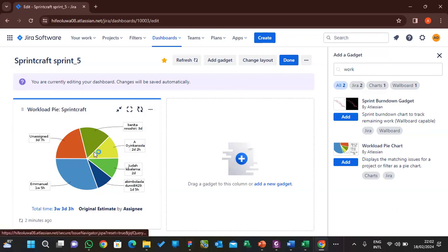I'll come back here for you to see that user story point is different. It is a relative estimate to size the user story, considering the workload that is involved, and the risk that's involved there. But timing is for you to track the estimates to know if your team is being overused, the workload of your team, right? So I'll save this now and go back.